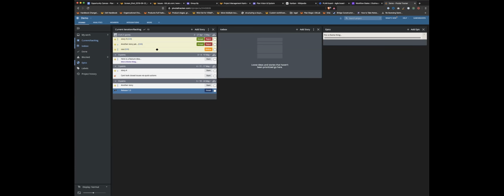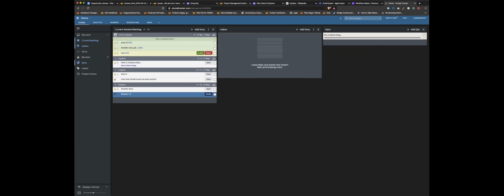After the review is done and it gets merged, you hit deliver, which means it's live somewhere that a stakeholder can go accept it. And this is where I would go accept it, in whatever environment we had for our acceptance environment, usually production. So I could go through and say, okay, yes, this meets what we talked about. This meets my expectations as a stakeholder. And then I click accept. This was particularly useful as a product owner or product manager, but also as somebody who worked with external stakeholders, where our customers were the ones we were building things for.